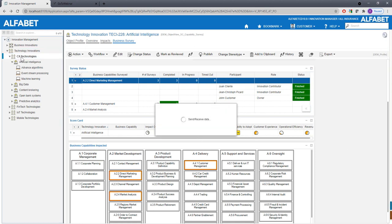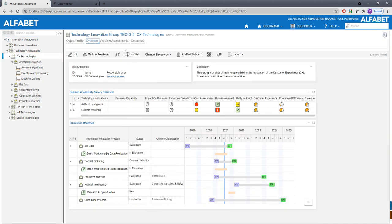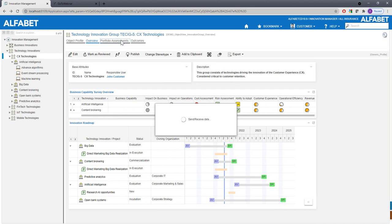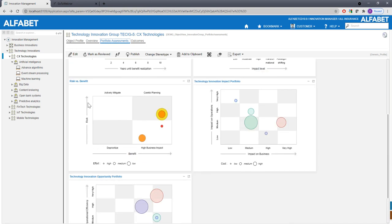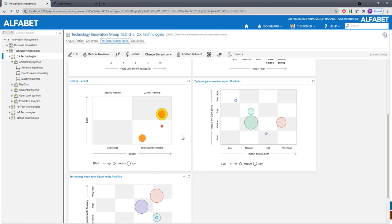Going a level higher to what we'd call the group level, we see a roadmap again. I want to point out the portfolio assessments — there are various ones defined. Looking at one quickly: what is the risk of the proposed innovation in terms of our ability to use it, and what is the benefit? The things at the bottom-right with low risk and high benefit are what will interest us. We also have further indicators such as color representing the impact — whether it's transformational or not — and size representing effort. Something in the right quadrant with little effort and big impact is what we'd focus on — considered more of a quick win. This supports the decision-making process.